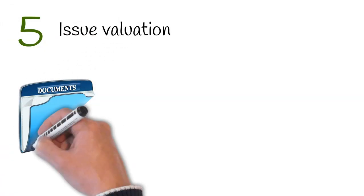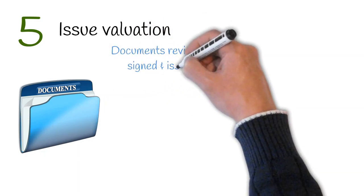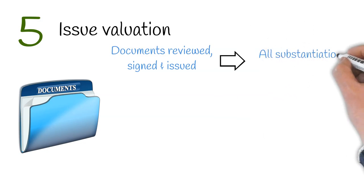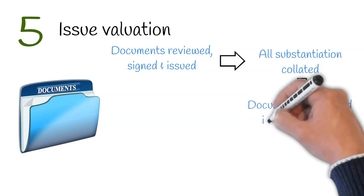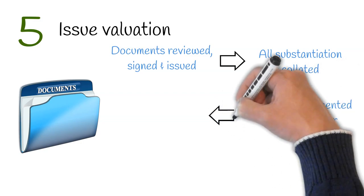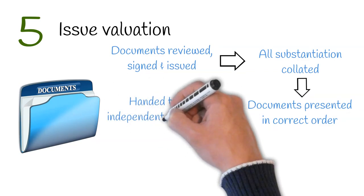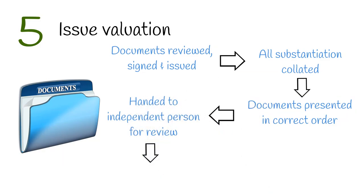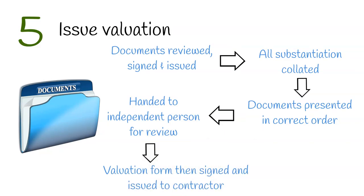Stage 5: Issue Valuation. In this stage, the valuation documentation is reviewed, signed and issued. This is assembled with any other relevant valuation documents. The documents need to be in the correct order, i.e. covering letter, valuation form, contractor's application for payment, together with any schedule of adjustments and narrative. The documents will then need to be given to an independent person to review for any last minute adjustments to be made. The valuation form is then signed and issued to the contractor.